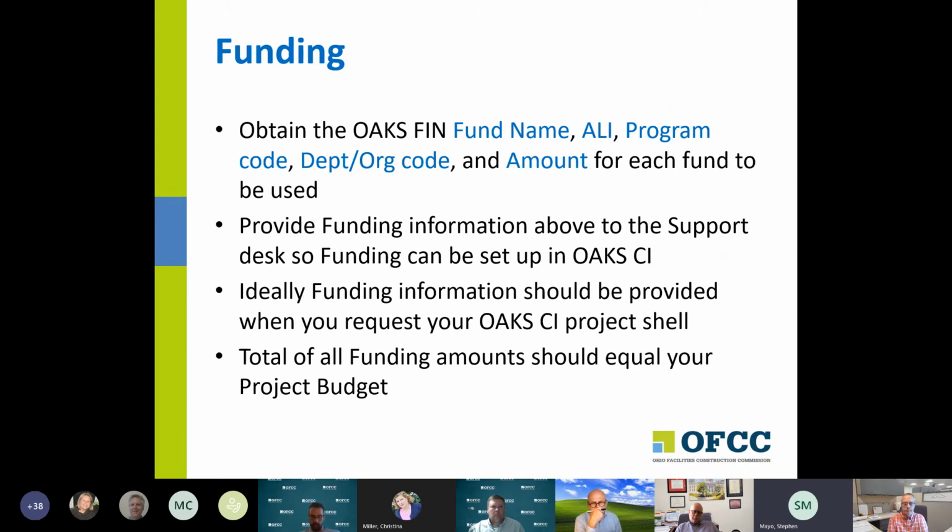These can be changed through the project, like budgets and other things change. It's perfectly acceptable to change the funding mix through the project. You can bring new funds in. You can change the amount from funds. So once you get that funding information, then we'd have you provide it to the support desk, and they will set up the funding in OCI. There's a couple of steps to doing that.